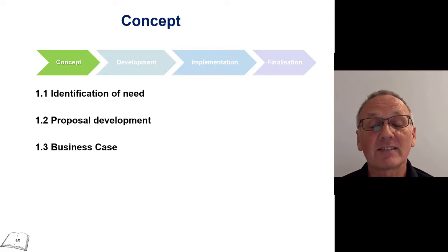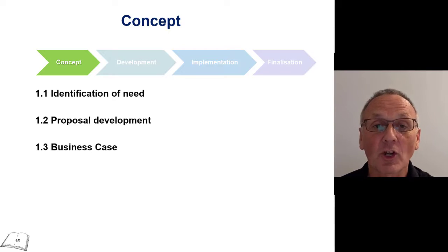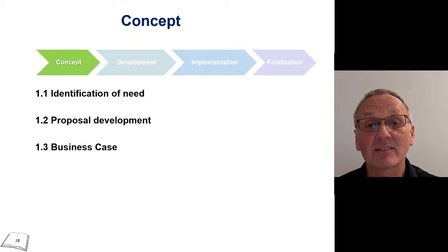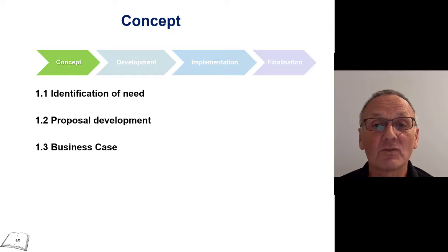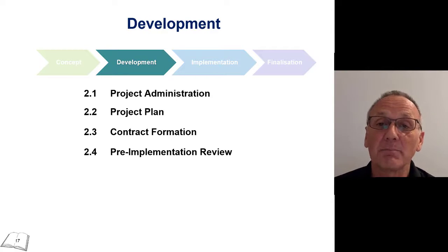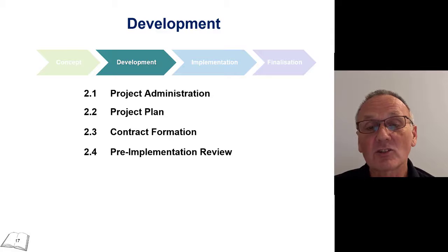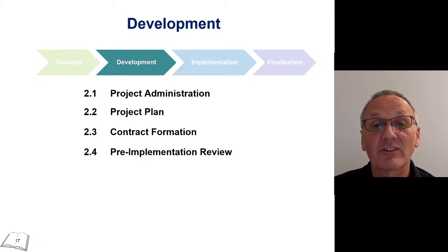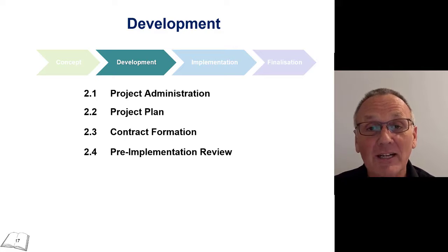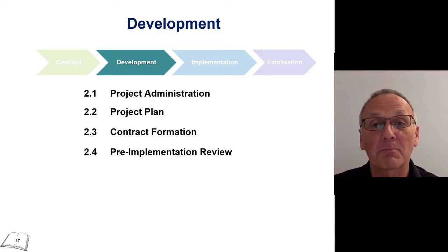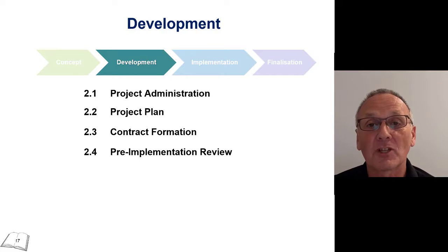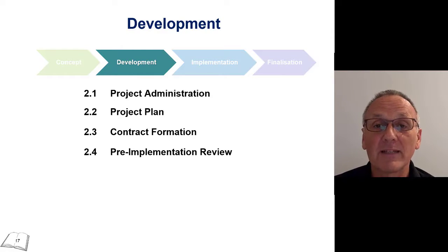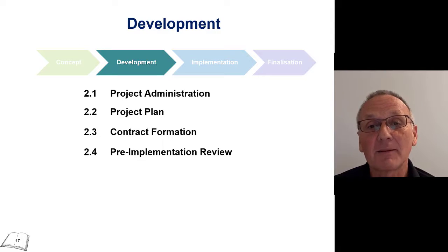The end of the concept phase tends to be a milestone, which is a decision about whether the project proceeds or not, a yes or a no. If it is yes, it moves into the development phase. It may not be an immediate change from the concept to development. Many projects will get a yes in the concept phase, but then will sit on the shelf until there are resources available, like the project manager, to then take on and develop up that proposal into a full-fledged project plan. So it may not be immediate, but essentially once the development stage starts, that's where we go into detailed planning.